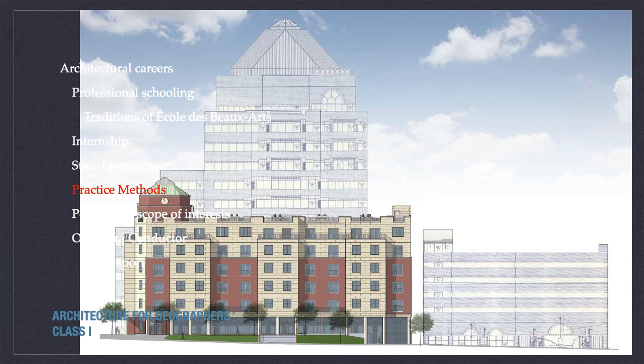Under basic architectural services, the client is supposed to arrive to the architect with a survey of the property that they own, a written building program, and an idea of a budget for the scope of work that they want to accomplish. Oftentimes, parts of that information aren't available to begin with, and the architect might provide pre-construction services or a pre-design study to help the client get to that first starting point.